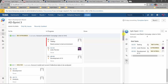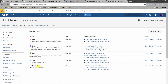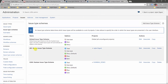Let's jump into the admin section and see how we can create that custom issue type. In the admin section you can see the existing issue types and the related schemas they are assigned to. In Jira, the project is mapped to issue type schemas. These are the different issue types currently available, and these are the issue type schemas. One project is mapped with one issue type schema, and one issue type schema can have different issue types.